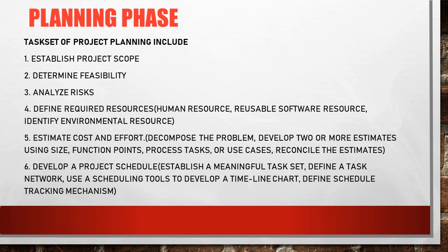The estimation report can include the background to the estimates, or a statement of effort, cost, and time estimation, proposed schedule or assumed resources, final products, assumptions made, risks to meeting the estimates, and recommendations.